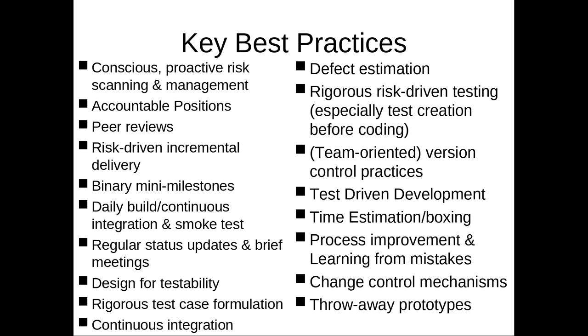Incremental deliverables tend to mean less chance that it'll just get dragged out more and more, with requirements layered on because more and more things are changing on the part of the client, or they want more and more value because of how long it's taking. If you do things in incremental deliverables, they're getting value along the way. And hopefully some of the highest value delivery is early.